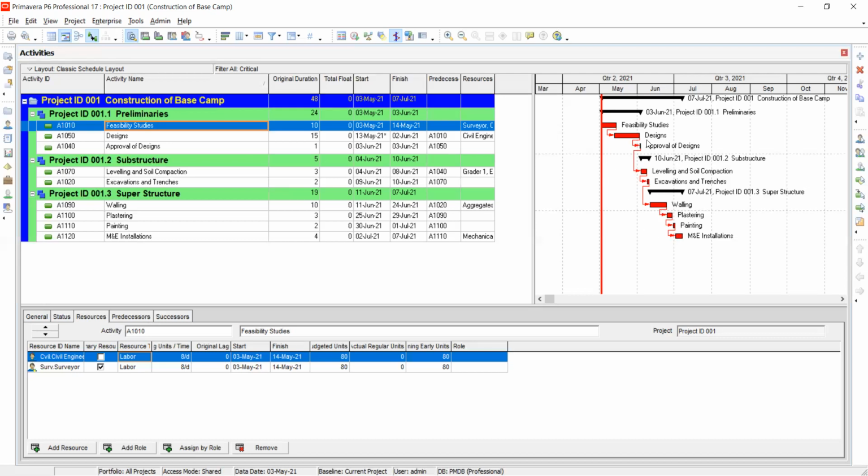So whenever you're planning for mobilization, maybe to buy material, assigning resources, you should assign resources to the critical path first, or plan earlier so that you don't get time overruns. For example, if this activity is going to happen on 4th June, you plan for it earlier so that you know which resources you will need. Will I need a grader? Will I need another technical personnel? So you hire them in time so that you don't delay. That is very, very critical. So that is a critical activity.